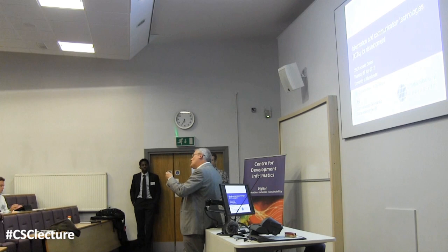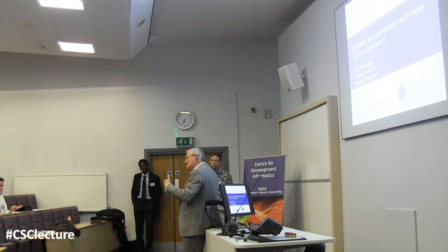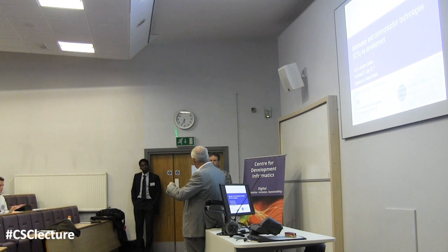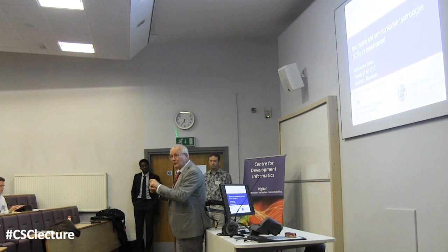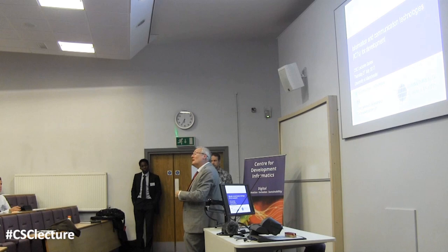Superficially, one might think that if you're used to working in a culture where there's a very command and control, Taylorist kind of view of management, moving to this would be hard, because these methods tend to be associated with what we call self-organising teams. So the idea is that each member of the team is not being told what to do on any particular day, rather they're saying there's a pool of tasks, I'll do that task, another member of the team will say, well, I'll do that task. And so it's a more self-managed kind of approach.